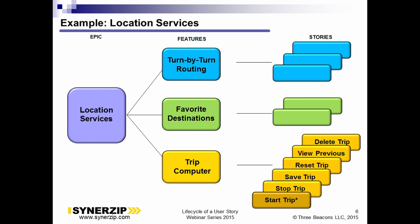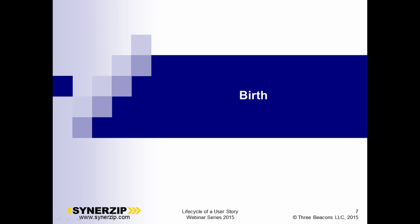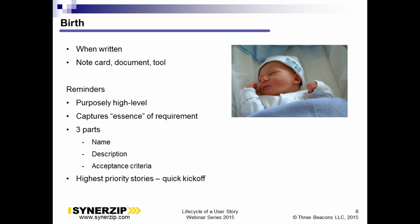Here's the syntax of the user story. There's a raging debate in Agile land — half the Agilists believe the syntax is useful, the other half find it cumbersome. I'm in the camp that says it is useful, especially if you're new to this technique. The 'as a role or who' helps set the context of the story. Then explicitly identify what functionality you want as that particular person or role — the business value. Identifying the business value helps ensure all your user stories deliver that stated value.